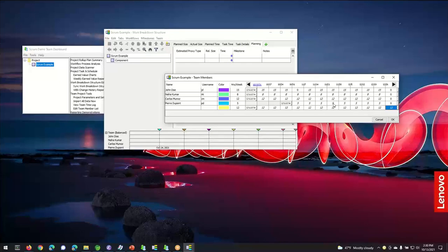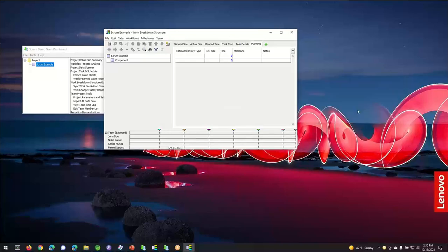One of the reasons for that is that story points vary a lot from one individual to the next. I mean, story points are very much a team measurement concept. How many story points a team can get done in a week, and the amount of time it might take one person to write one story point, etc., might vary slightly. So we use hours in order to produce estimates that are more reliable and more meaningful.